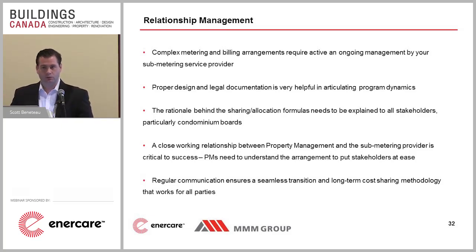We recommend getting into more detail at the declaration phase with proper planning so that everyone who's entering into an agreement has an understanding of what's going to happen and what their particular utility costs will be and how they're allocated. It should talk about rates, any formulas if available, and if you do this early enough in the design, it's easy enough to include the formulas and the ratios so that it's not after the fact people are arguing about who's responsible for what percentage. It's clear, it's in black and white, it's formed part of the declaration,